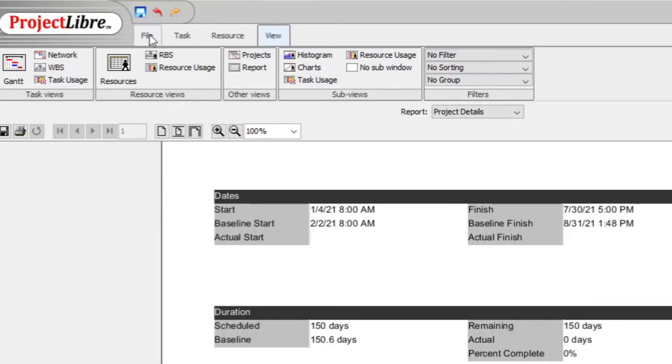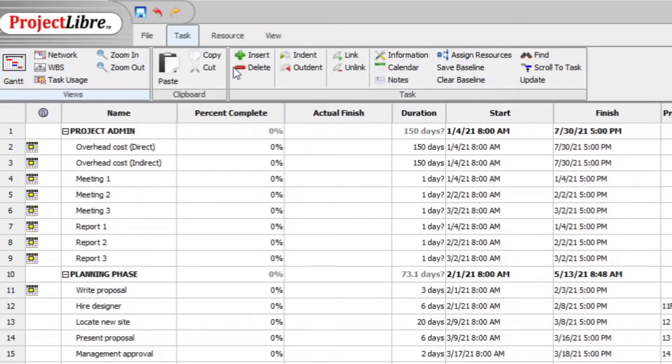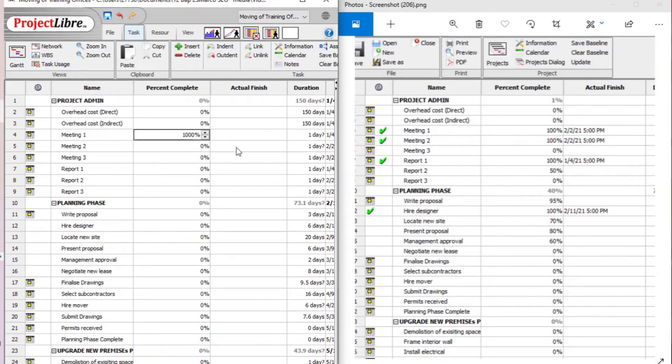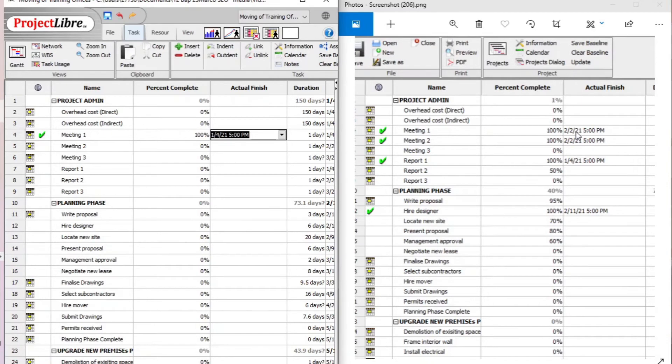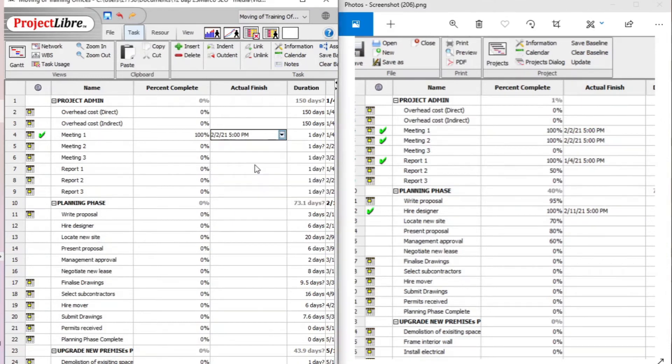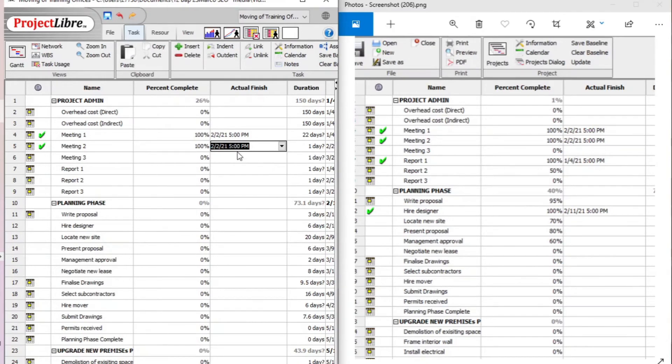So now you go back to your tasks and then to the Gantt view. And here then what you do is you then go back to the screenshot you made or whatever copy print you made. And now you insert the percentage of work that was completed. In this case, here's meeting one. It was 100. First meeting was 100% completed. And the actual date was then the second of the second month, 21, we set the date, five o'clock. Following task is meeting two. Meeting two is also 100%. And that was completed also on the second, the second month, 21, five o'clock. And so you continue.